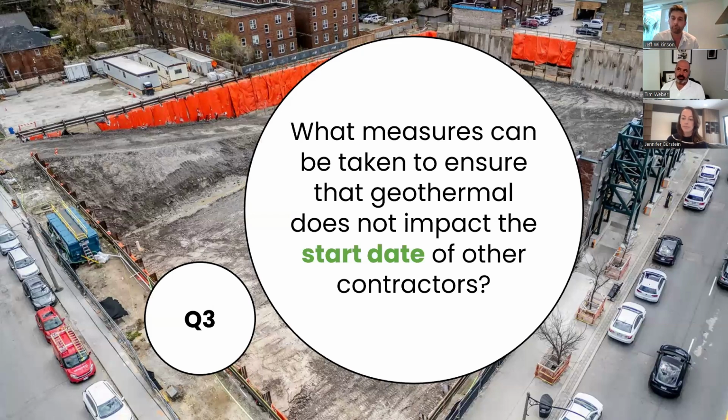Yeah, and we've done both, and it's very project specific, as you mentioned earlier, Jennifer. If there's other trades on site at the same time as geothermal, it probably doesn't make sense for the geothermal provider to pull that NOP if it's done sequentially. And I think the geothermal provider would kind of lean on the CM to help with that process. But either way, those are all things that need to be discussed up front.